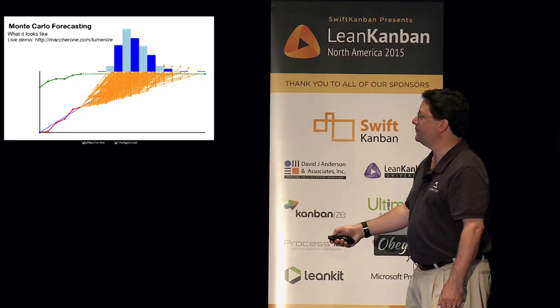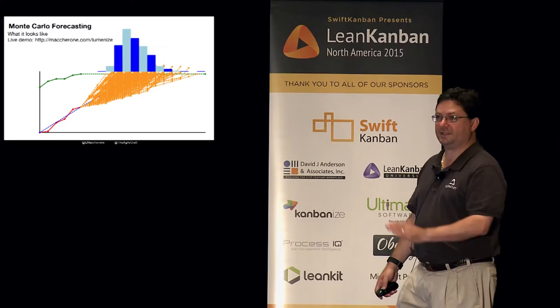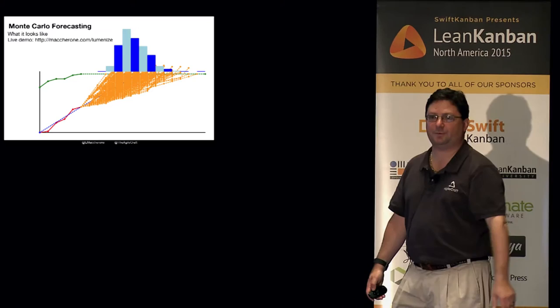So this is pretty much close to a Poisson curve here. And if we run it, it took a second there. If we run it hundreds of times, we get a very smooth curve, and thousands of times would be even smoother. We built a probability distribution here.